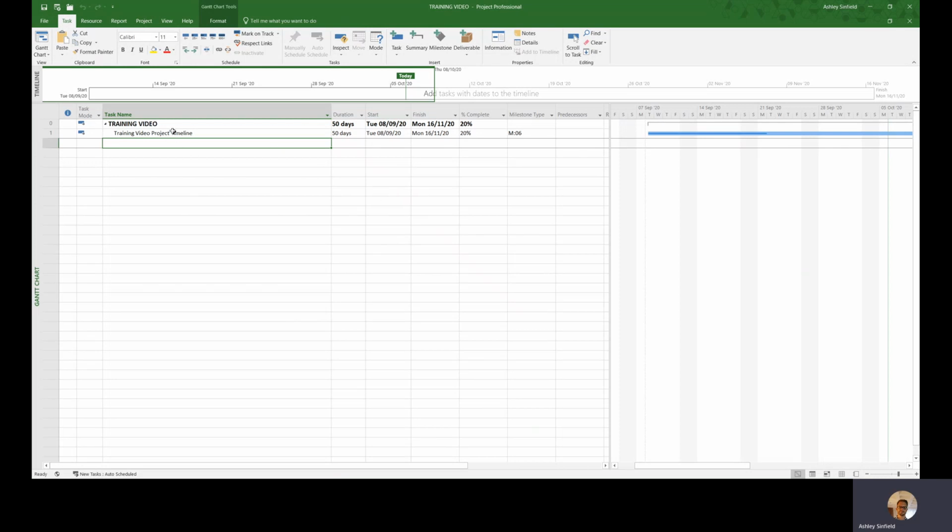When you first download the project schedule, you will only have a project line 0. This essentially is just the project entry in the system and contains no real detail as to your project or program. You can add in as much detail as you wish into your project plan, as the system is capable of handling very large plans. However, as a bare minimum, you need to add at least one task line that represents the entire timeline for the project, as I've done here.